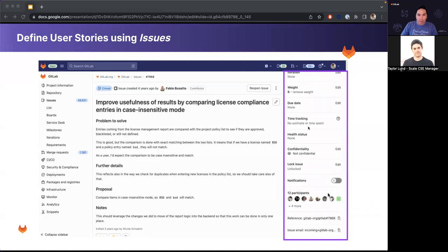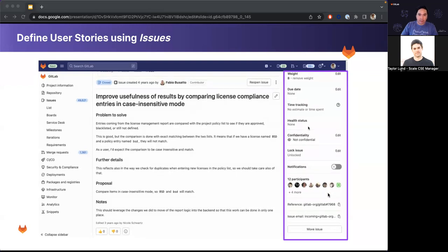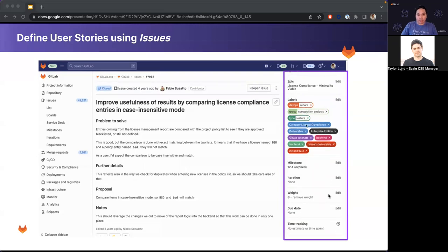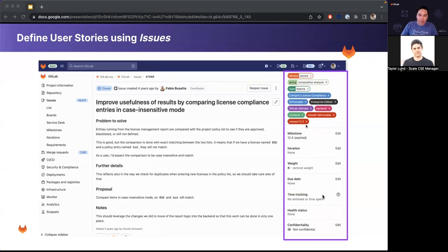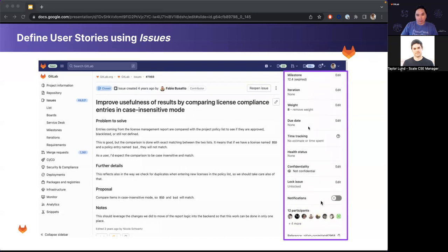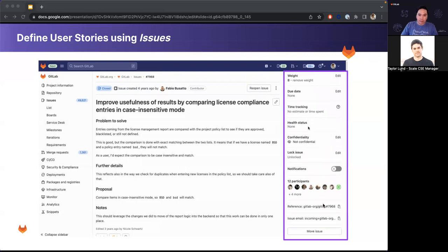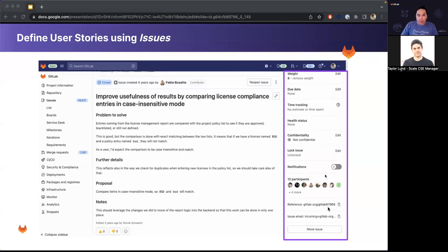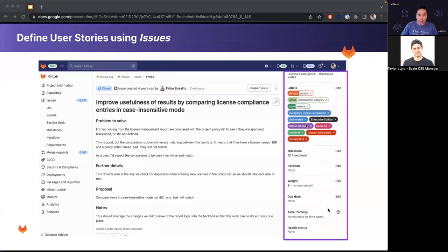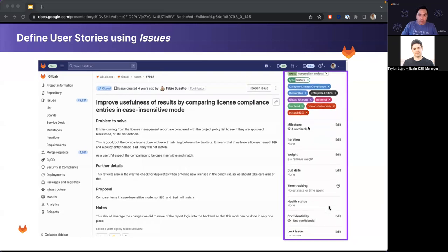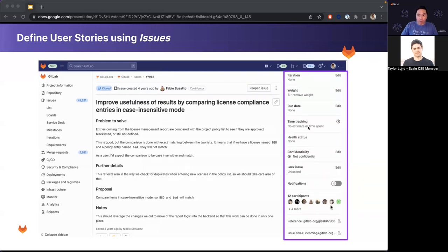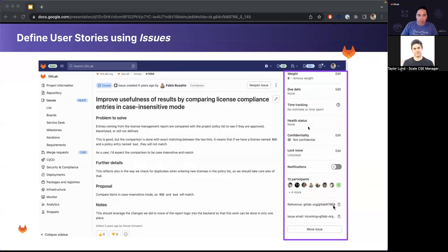And so it really represents that relative difficulty, and you can use that to see how many complicated issues are still remaining in your backlog, for example, or how many complicated issues have been completed. So these are all whole positive numbers that you'd be assigning in the issue weight. And some common patterns that you would utilize for the issue weight are the Fibonacci sequence, or whole numbers that you've aligned to t-shirt sizes that you might have used in previous DevOps tools. So if you're using small, medium, large, for example, you may have a weight of 1 for small, 3 for medium, and 5 for large.